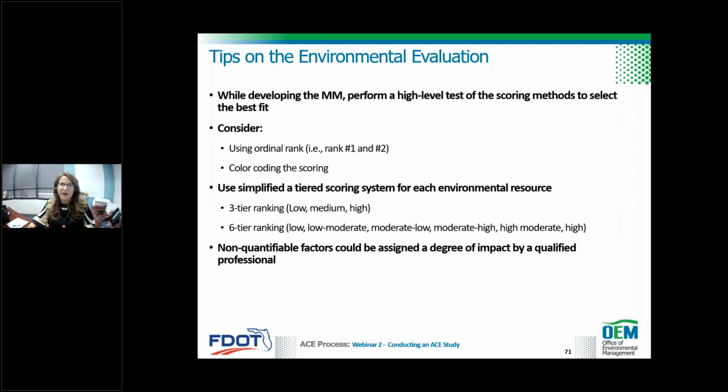Moving on, the environmental evaluation, as you know, is one of the most complex activities done within any study, and that's due to the amount of data that has to be collected and compared. When determining the method to use, perform a high-level testing of the scoring method to make sure it's the right method for you. Consider a simplified scoring method for the environmental evaluation.